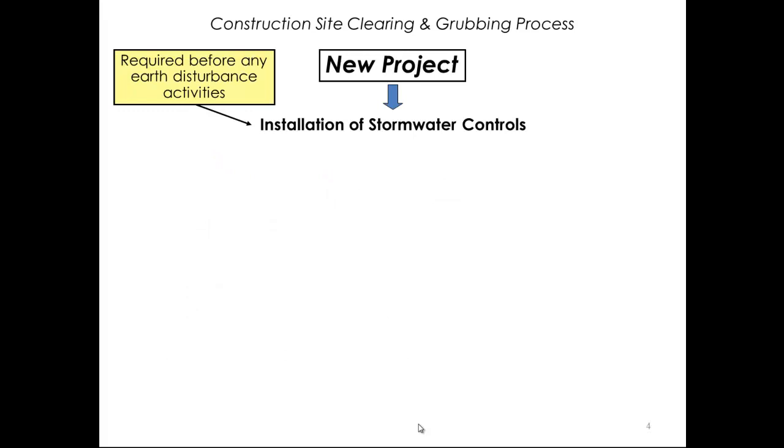If you have viewed the stormwater compliance video, you will remember that the installation of stormwater controls is the first activity on the site. Sites will often have preserve areas which are designated to have the trees remain. The identification and protection with fencing or barricades of these areas is important before wholesale clearing operations begin. It is also common that selective clearing or underbrush removal and even pruning of trees to remain be performed initially.